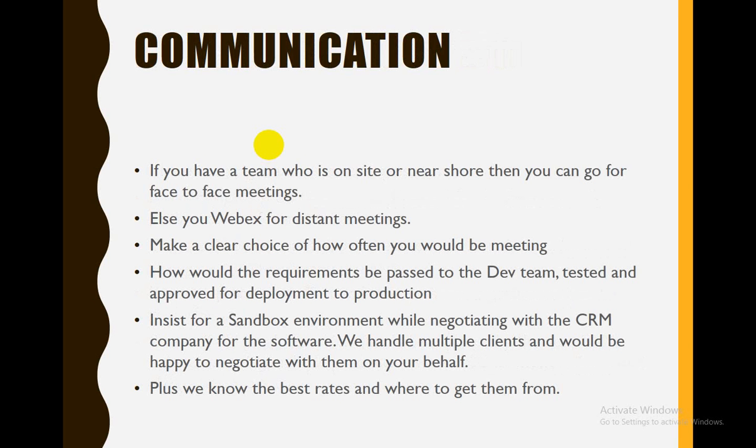So assume you have a team here in India who would be fixing the entire product for you, which is a mammoth task, by the way. Then you must have a communication plan in place. You can have it in an Excel sheet, but how often would you talk? What points would you talk about? How would somebody raise a red flag? How do you ensure that the requirements are gathered properly and communicated to the team properly?